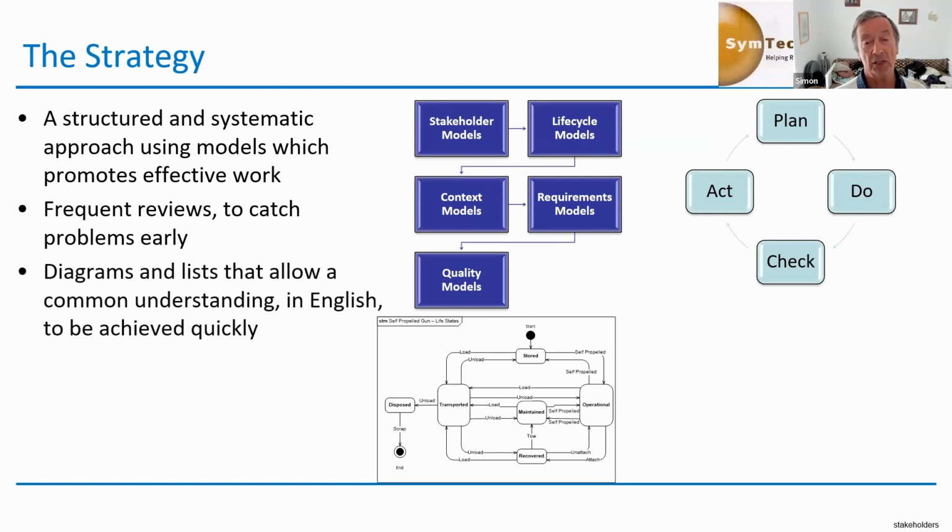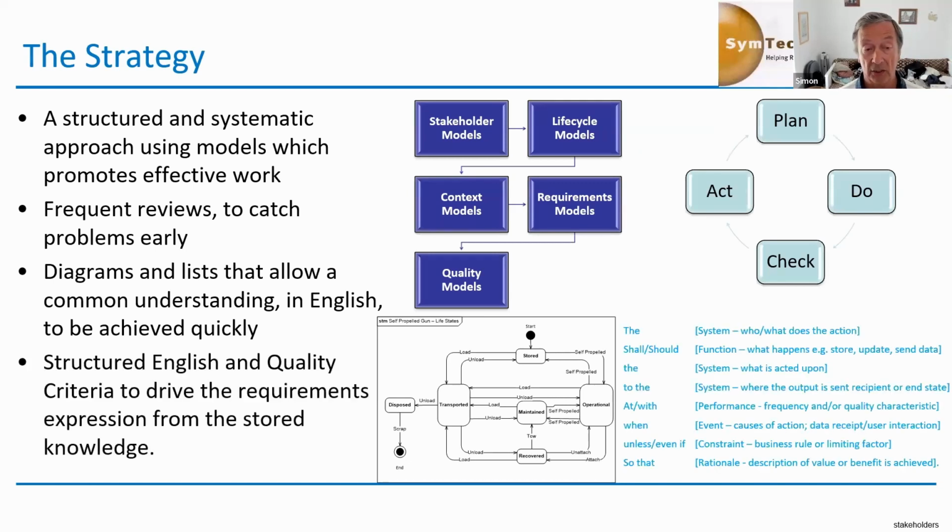Because none of those systems were coming from a country where the language was English. So the Norwegians, the first language is not English, as well as the 4 bidders. We were going to concentrate on diagrams and lists to allow us to communicate this common understanding in English and to achieve that quickly. And we were also going to use structured English and quality criteria to drive the requirements expression from a stored knowledge base. So I'll explain how that was achieved.